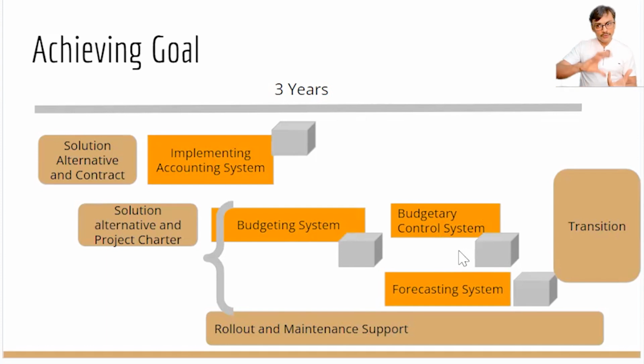So new project components can get added throughout the program's existence. And there is a possibility that some of the existing projects may get changed or removed, or their scope may change, in order to manage our overall optimum program-level objective. Our focus is that we need to achieve financial management. We need to achieve our program-level KPIs. The program group is focusing on that, and in order to manage that, they might be playing with the component projects' scope and delivery timelines, or with the creation or removal of some of the projects inside the program.